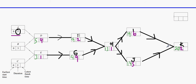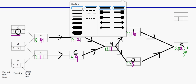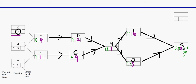That is the early start time algorithm. The latest finish time algorithm works in a similar way. We have twenty plus two making twenty-two, so the latest finish time is day twenty-two. K must finish on day twenty-two. For the backward pass, instead of adding we subtract: twenty-two minus two makes twenty, so we get twenty and twenty coming back from K.